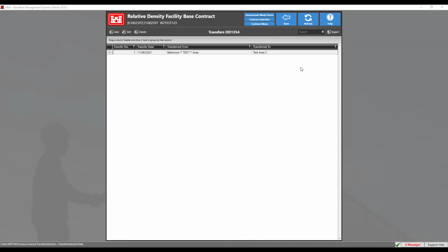One additional way to get real property items into RMS is via the Import-Export module, Import Real Property option. This might be used by users who cannot enter data directly into RMS. For construction, design, bid, build jobs, UCAS regulations require the designer to provide or obtain a draft 1354 around the same time the BCOES review is conducted. The designer will need to coordinate with the Garrison Real Property Officer to ensure appropriate real property ID and category codes are selected for the real property items.